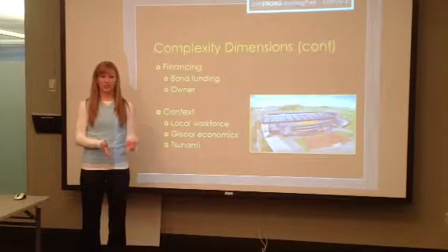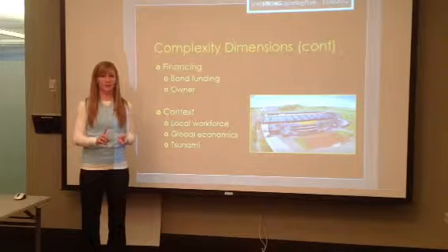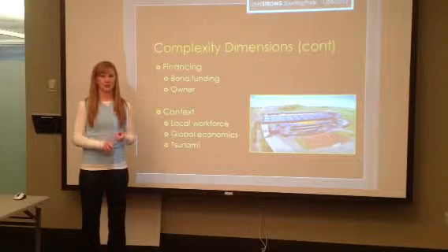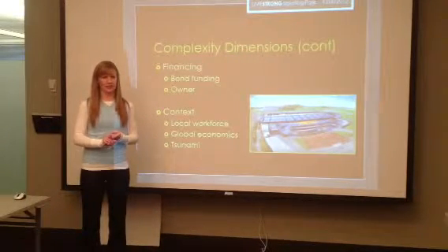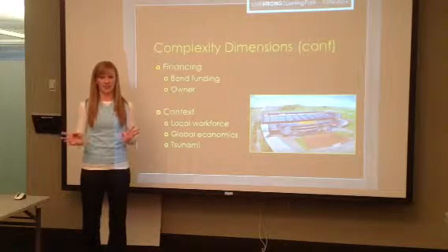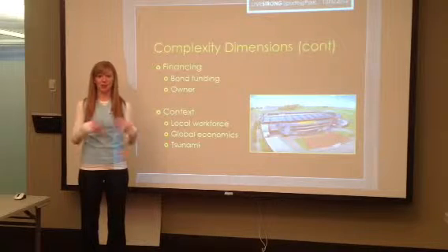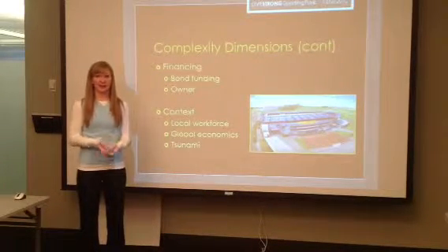Our contract with the owner was tied to the contract with the city, which means we had to meet local requirements: DBE, WBE, MBE. We were attending career fairs, hosting career fairs, and calling and emailing subcontractors all around the city and state. We were also trying to get the local workforce to come work for us for the self-perform work.